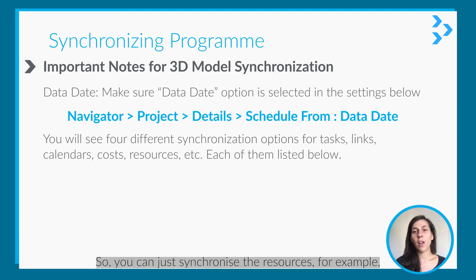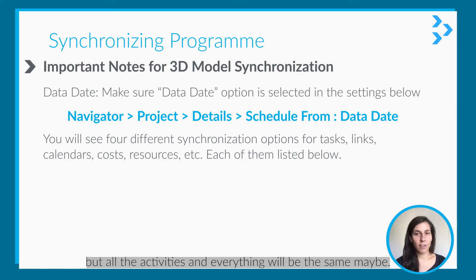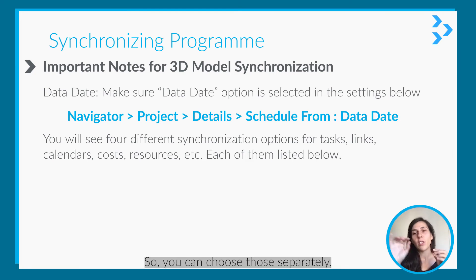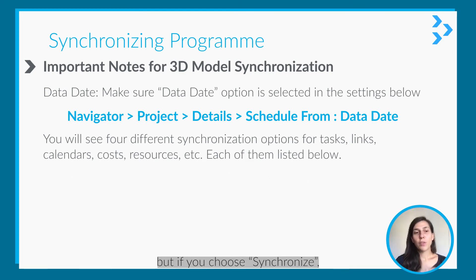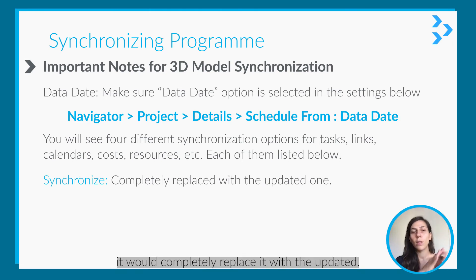You can synchronize specific elements separately — for example, just the resources or just the cost — while all the activities and everything else remain the same. However, if you choose Synchronize, it will completely replace the existing data with the updated one.